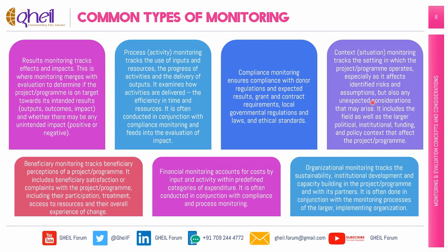Context, situation monitoring tracks the setting in which the project program operates, especially as it affects identified risks and assumptions, but also any unexpected considerations that may arise. It includes the field as well as the larger political, institutional, funding, and policy context that affect the project program. For example, a project in a conflict-prone area may monitor potential fighting that could not only affect project success but endanger project staff and volunteers.